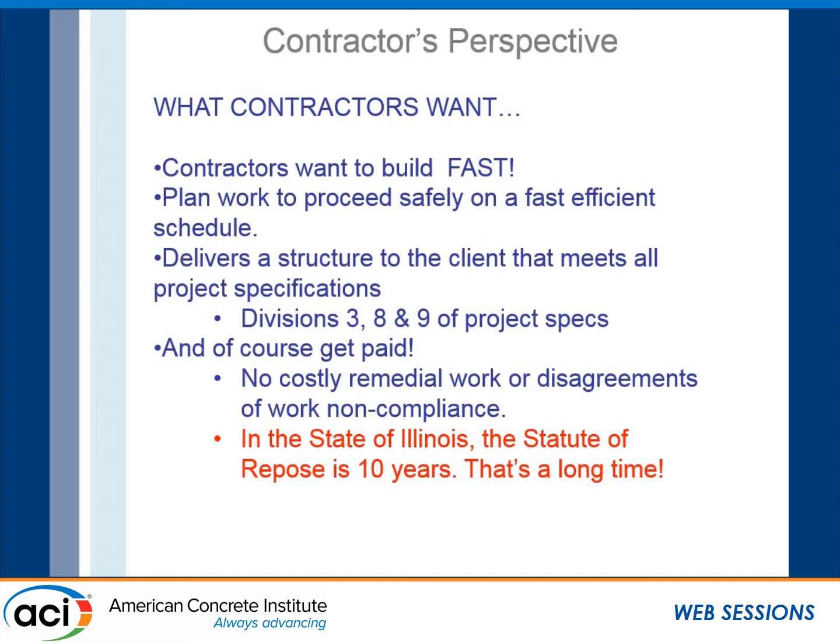And as the previous speaker in the morning stated, we can be on the hook for quite a long time. In the state of Illinois, the statute of repose is 10 years. That's really a long time. So being asked about where your concrete was poured and where top of slab or edge of slab is, and having to defend yourself and potentially be on the hook for remedial actions, it's a problem.